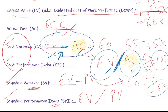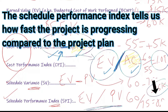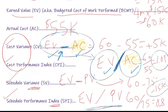For the schedule performance index (SPI), it's earned value divided by planned value: 60 divided by 75, which gives 0.8. That means we're running at 80% speed, which makes sense because we did four miles instead of five miles — four is 80% of five.